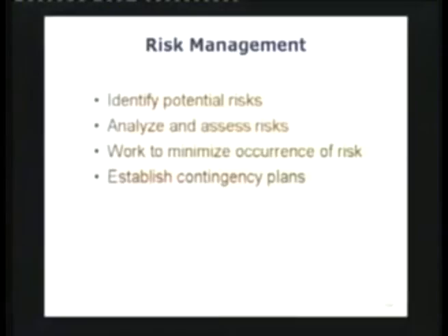Once you've done this, then you move on to analyzing those risks. And there are two dimensions in which you analyze every risk. A risk is an event that is undesirable. One is the impact dimension: how severe is the impact going to be? If something goes wrong, what will be the impact? The other dimension is probability. Impact and probability. If it's a high probability event with high impact, it's a highly risky situation. That's something I cannot really live with.